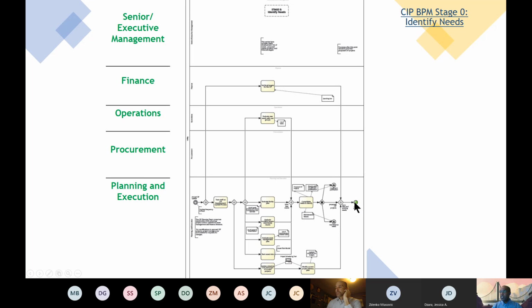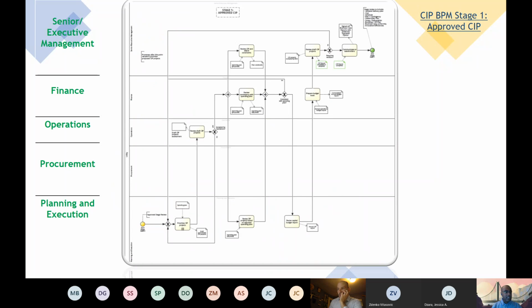That will have a big spreadsheet with all this data, and this ends stage 0 of the process. So, as I said, there are inputs to the stage, and there is an output of the stage. And before we go to the next one, there is a checklist that we check whether this stage has satisfied its requirements before it goes to stage 1. And this is stage 1.